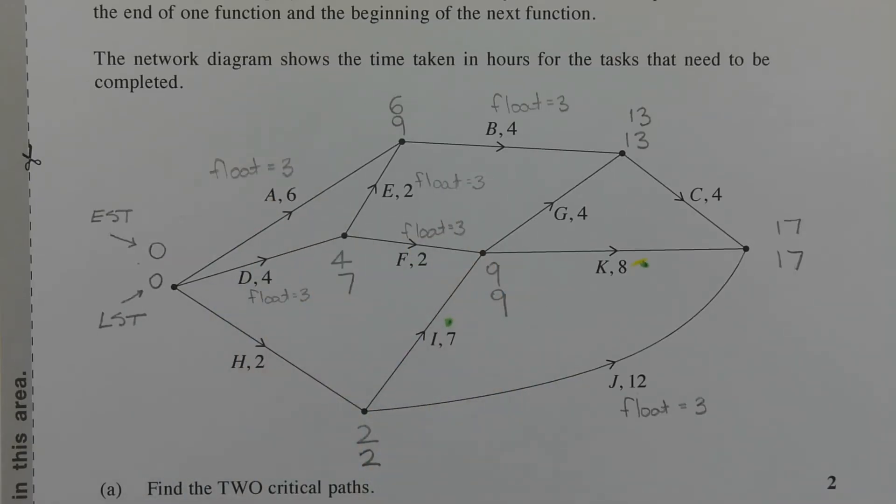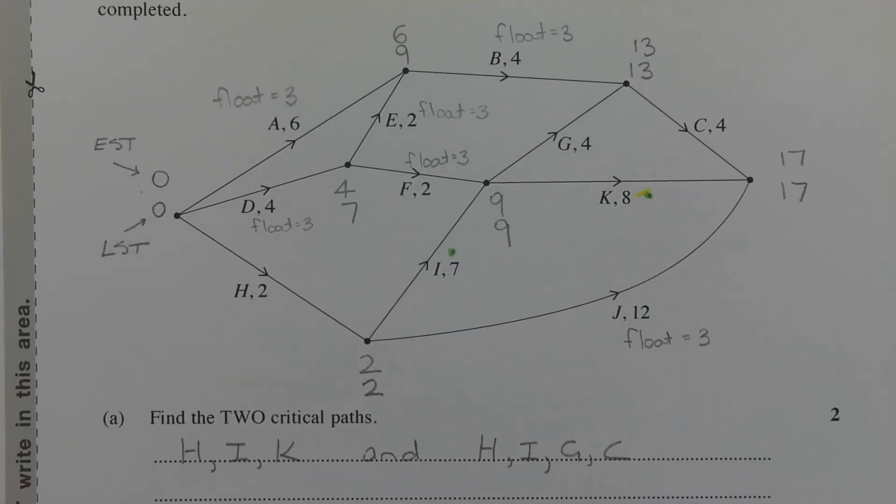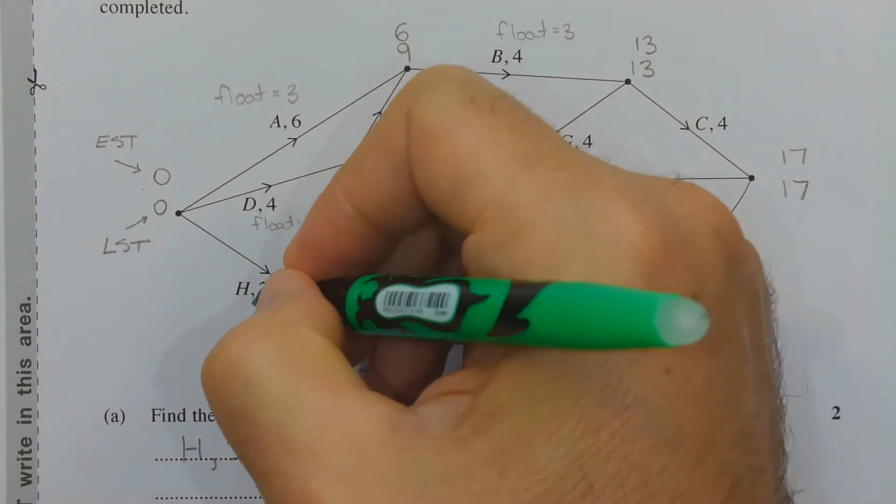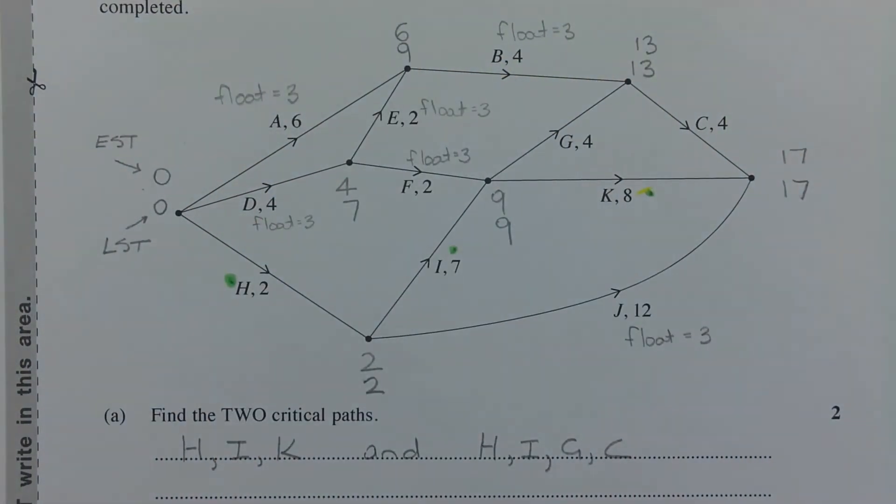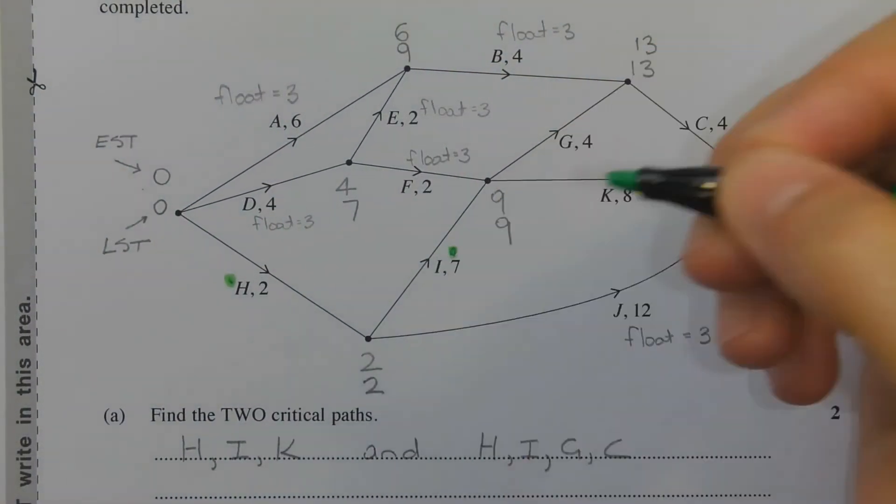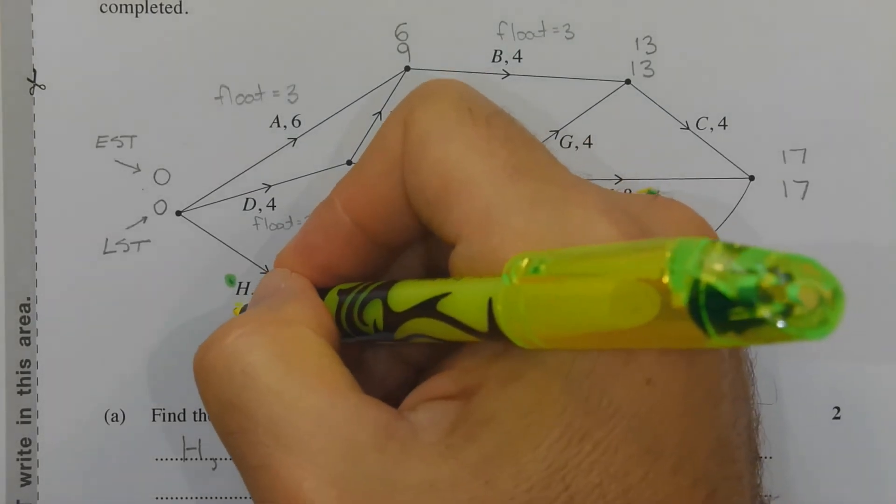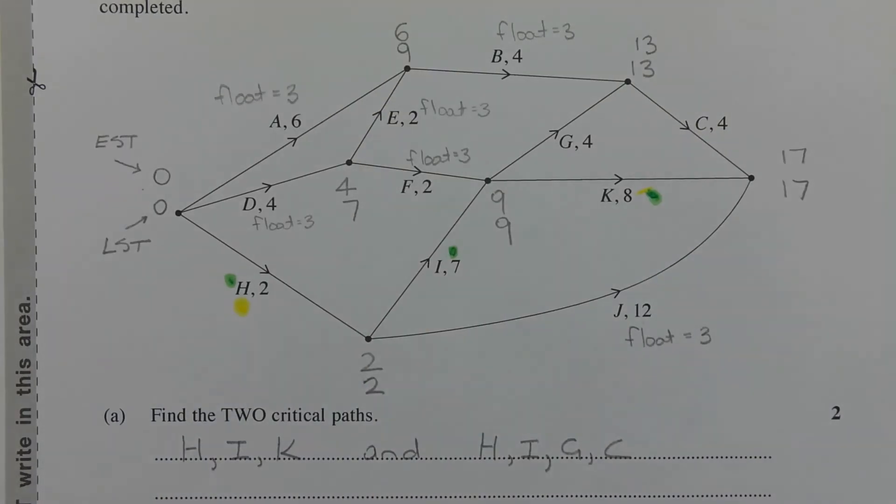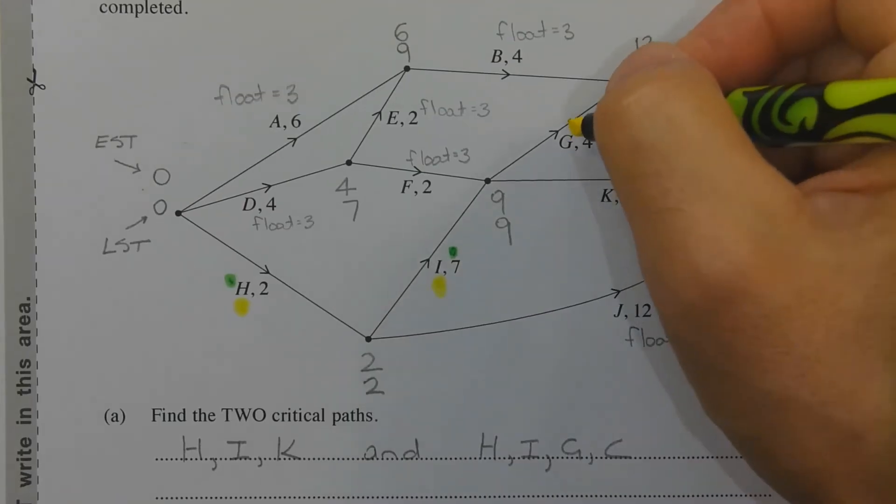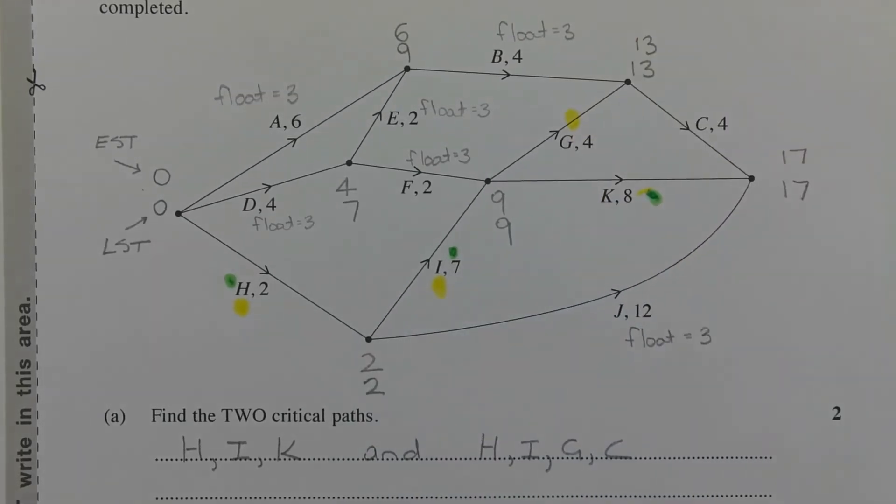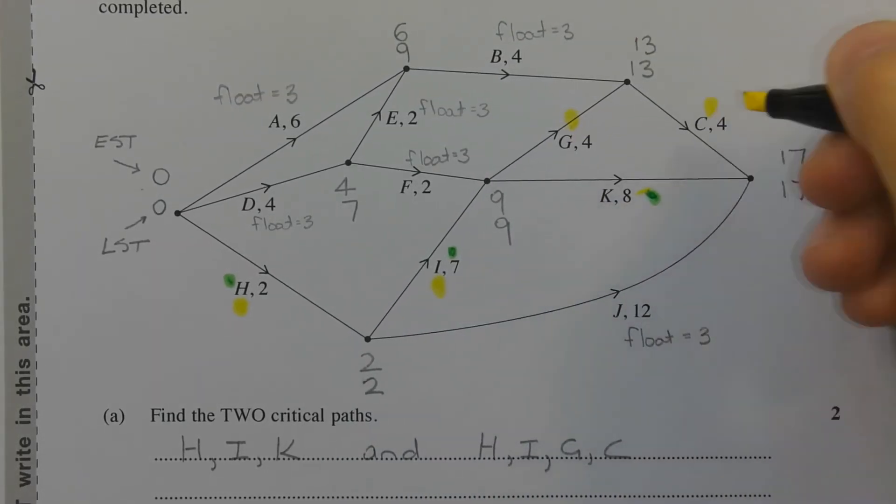And so the two critical paths are H, I and K. So that's this task here, this task here, and this task here, and H, I, G, C. Part B. So I'll try and use the yellow highlighter again. Make that a little bit more prominent. So H, I, G, and C.